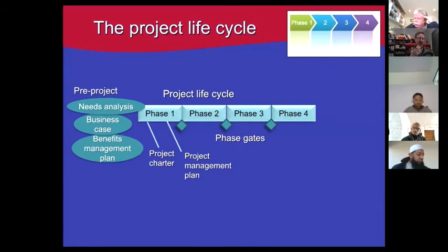So, for example, there's a process called Develop the Project Charter. There'll be a whole lot of tools and techniques there that you can use in developing a project charter, but you're not going to use all of them. Tailoring will be to say, well, I need this and that tool and technique. I'm going to scrap the others. Is that clear? Yeah, that is very much clear. Thank you very much. So as per what you're saying, as per your industry, basically where you're working in, you will filter those things. Yes. Thanks very much for that explanation. So you don't tailor the phases, you tailor the processes and the tools. Yeah, correct. Thank you very much.